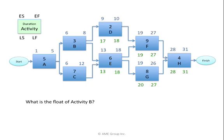Activity B is a little trickier. What's the latest B may finish for D to have a late start of day 17 and E a late start of day 13? I look at the smaller number, day 13, and subtract 1. The latest B may finish is day 12. Looking back at activity B, what's the latest B may start? 13 minus 3 plus 1 equals 10. The latest B may start is day 10, with a duration of 3 and a late finish of day 12.